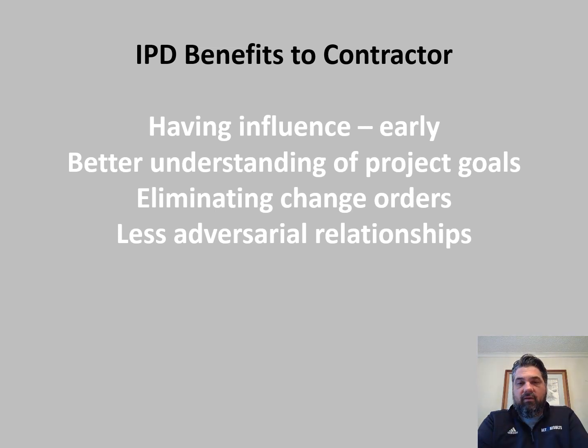Just because you've had all these conversations with the owner, in a design-bid-build scenario, that doesn't mean the contractor understands that. Even if you tell them, they're never going to understand it to the level that you and the owner have discussed it and understand it. And so by having the contractor on board early, it makes it easier for them to make value judgments when they need to in the field.